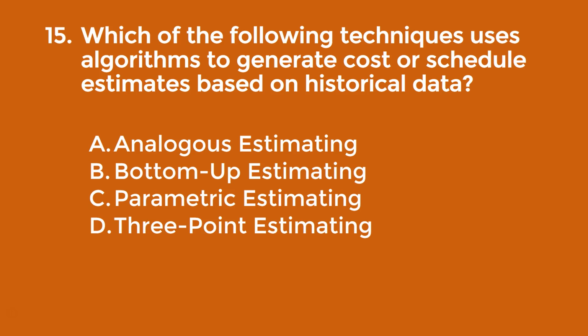Question 15. Which of the following techniques uses algorithms to generate cost or schedule estimates based on historical data? Okay, the answer here is parametric estimating. The way that I remember this is by thinking about the word metric and parametric. So metrics are mathematical, just like algorithms.